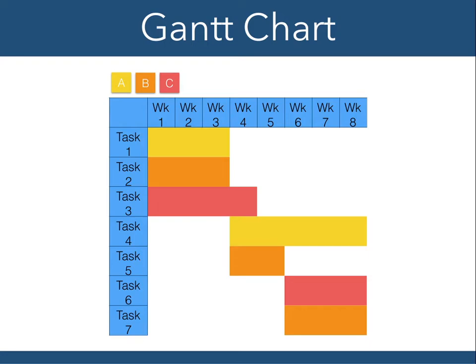You start by working out what the interface is, where all the different tasks connect to each other, and what those connections look like, what the function calls are if you're doing object-oriented development, what objects are going to exist, what they're going to be called, and things like that. So that's really, in many senses, the key skill. You work out what the different bits of the program are going to be, how they interface with each other, and then you can start splitting them up and give them to different developers.